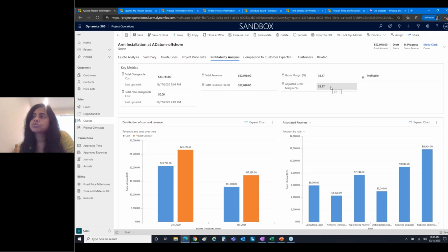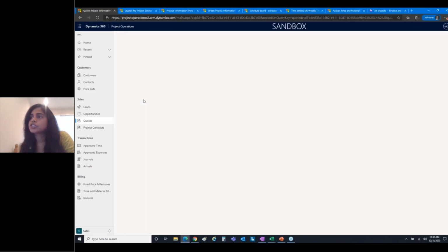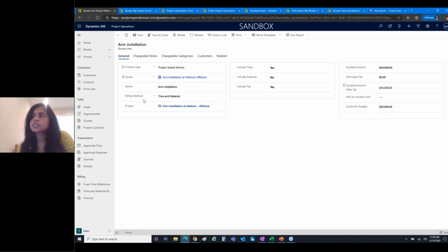In addition to the pricing and costing that's driven based off of your needs, you could also have additional negotiation vectors on your quote, whereby you could say what components of my quote are going to be chargeable, what components of this quote are going to be non-chargeable. For example, in this quote, I have some fixed price components, and I also have some time and material components.